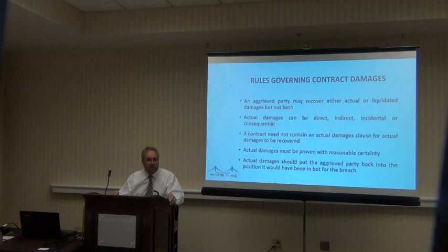So if you have an LD clause in your contract, setting aside how much it is, how it's written, all that, if you have a liquidated damages provision in your contract, actual damages are pretty much out of the picture at that point. Okay? But now let's talk about actual damages as the backdrop to going into what liquidated damages are and how they work. First of all, there are many forms of actual damages.